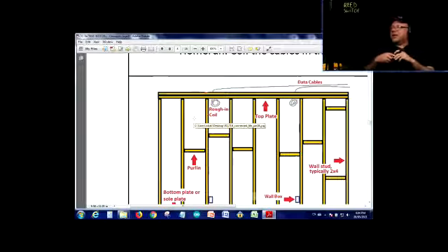So, roughing in is a very common term that's being used. How much do you charge for this? Okay, so you know what? We're just going to rough in the cables and we're going to charge you this much for roughing in. Maybe somebody else can do the installation, or you just do the installation in stages up to roughing in.